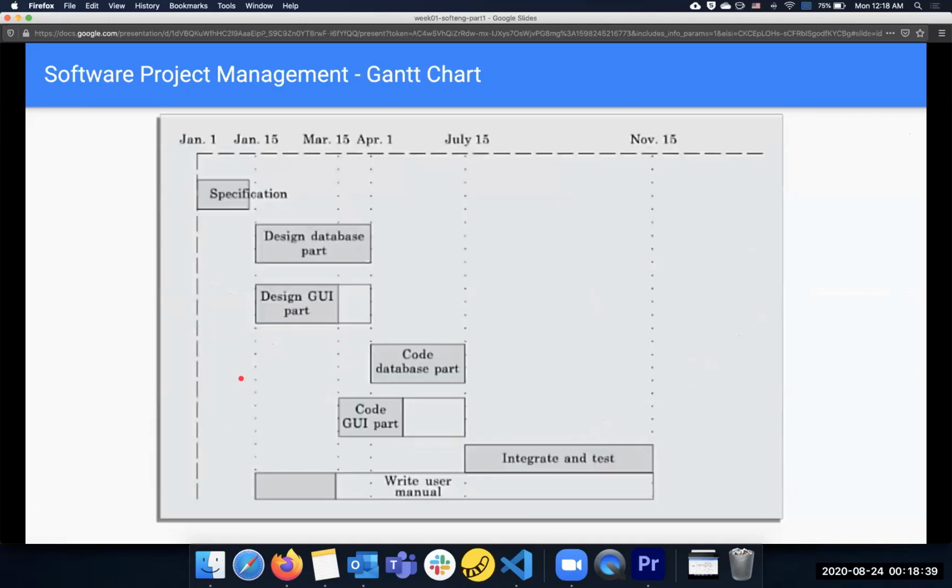And then once you get this done, you have a different view of looking at this, putting them into a specific timeline. This is called a Gantt chart. It's actually a specialized bar chart. You see, in the regular bar chart, X and Y are reversed. So this is another popular tool. And the box has a shaded and unshaded part. The unshaded part is just the slack, essentially showing the worst case of how long it's going to take. So you can put this in a Gantt chart.